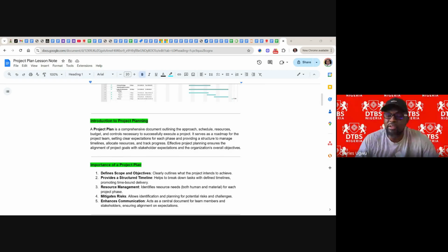Yes, we have the project breakdown structure, the one on Excel document. That document, a project breakdown structure, is a blueprint for a project plan. You use that as a foundation, a scaffold for creating a project plan. All you need to do is start breaking down all the activities. Some of them might need to be broken down further.